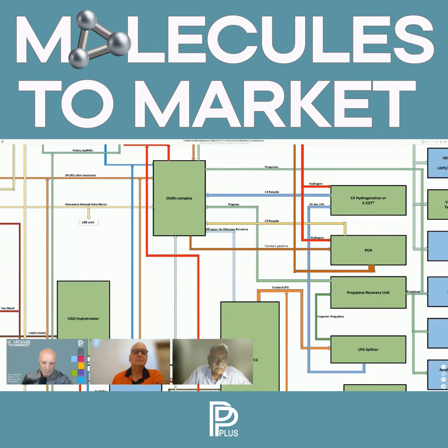That is number one. Number two is on an EPC mode, the owner is transferring the risk to the EPC contractor. Because in an EPCM route, the direct order is being placed by the owner. So it is between the consultant and the owner that they share the risk of the plant. The owner takes the risk.